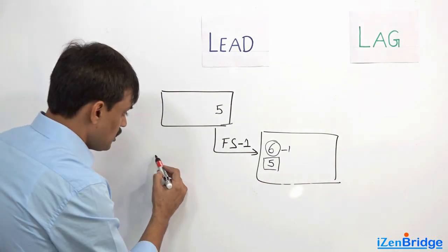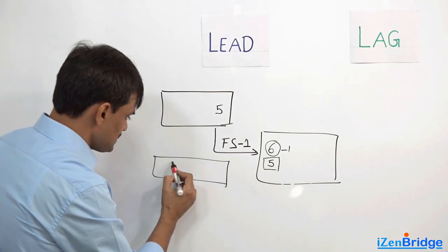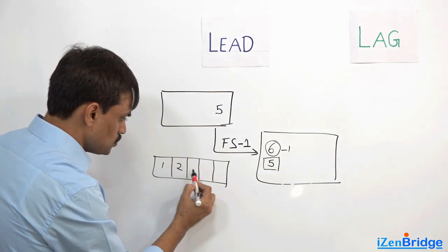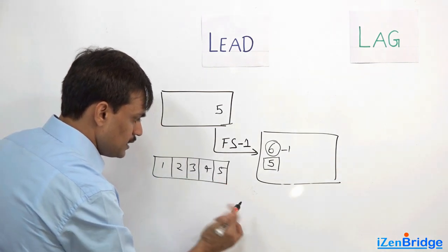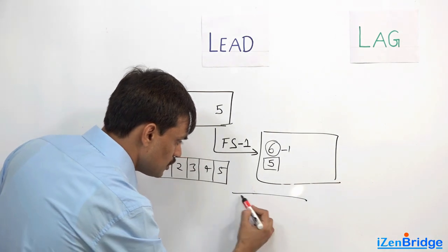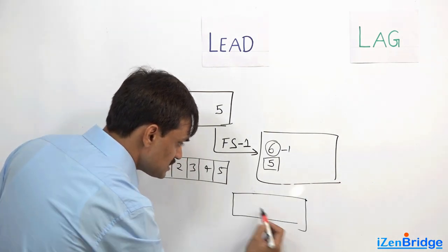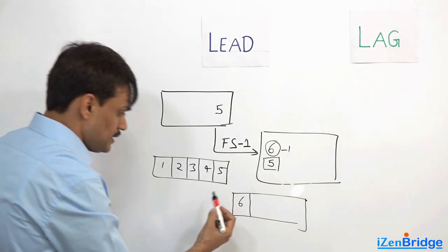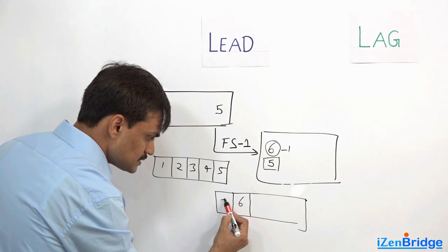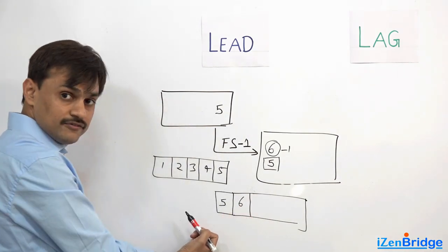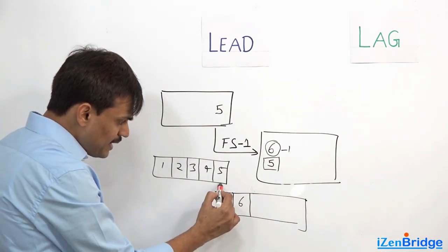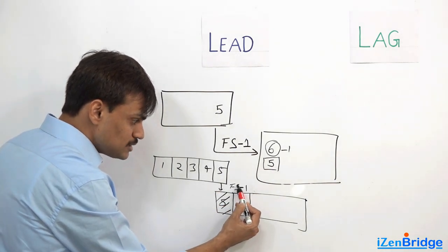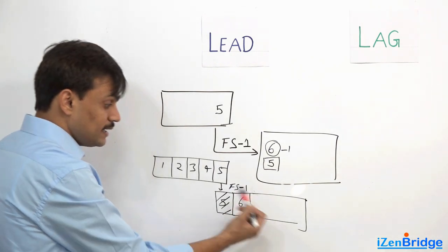So what does it mean? If you think of days like one, two, three, four - day one, day two, day three, day four, day five. In the previous stage if we had no relationship, we were starting this particular activity on day six. When I say you need to lead by it, it means I am starting it on day five. So what I did here is I made this activity maintain the relationship of FS but led by one day, so it means it will run one day in parallel.